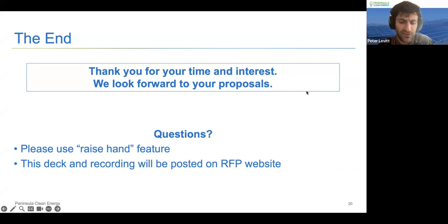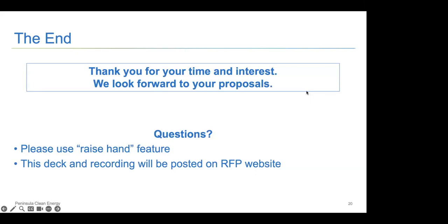Right. The two options here, Nick, are going to be either PCE owns all of the equipment in portfolio B and brings the direct pay provision, in which case we won't need any financier. That's option one for portfolio B. And then the other option for portfolio B is we are looking for a full suite of financing, CapEx and ITC rolled together into a master PPA. And that's all for portfolio B. Does that make sense? Yeah, got it. Thanks. Awesome.